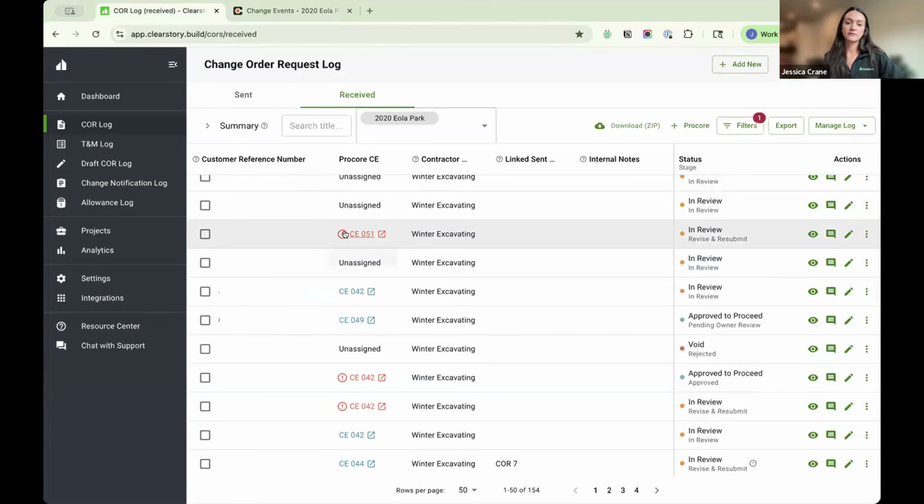These red items, for those of you that are unaware of those color codings, the red items mean that there has been a revision. So something about this change order does not match that line item in Procore anymore. So it's just flagging you to prompt you to review this change. Obviously, we don't want to push that into your budgets automatically. We want to give you guys the chance to review those changes before overriding that cost. And then if it is a legitimate change that you need to update, we'll walk through that same process, add to Procore, and then revise that existing line item.